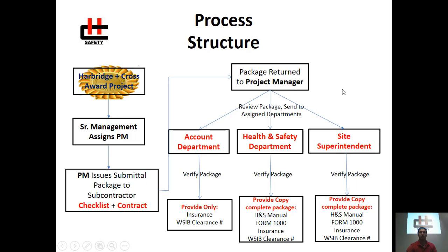Once the package is returned to the project managers, they must review the package and send it out to the assigned departments, including the accounting department, health and safety department, and site superintendents. Each department is responsible for verifying the package as an extra set of eyes.